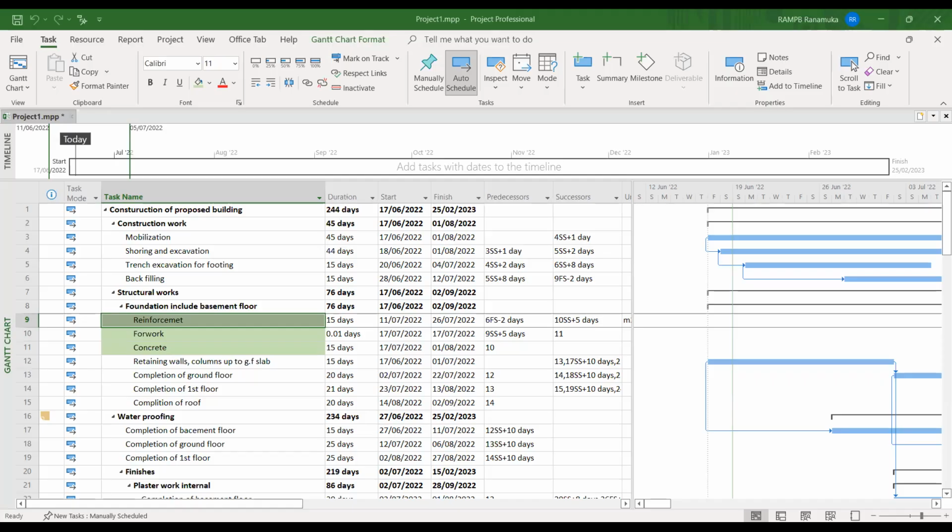Also, in the formwork and the reinforcement, there are a number of sub jobs. From the hacking to the setting out, there are a number of jobs, to leveling and concreting. So those processes I expected that you may include. Meaning this also we can